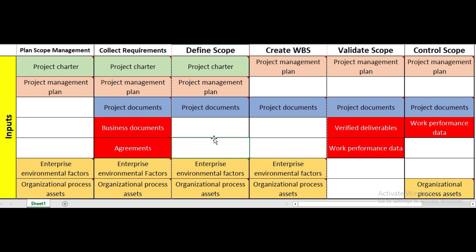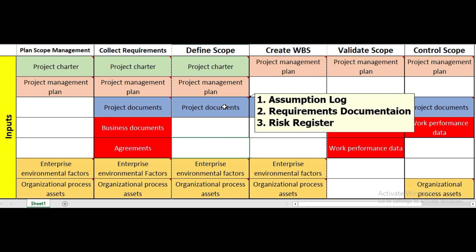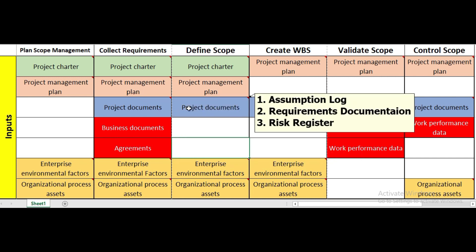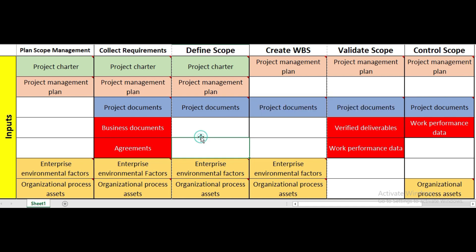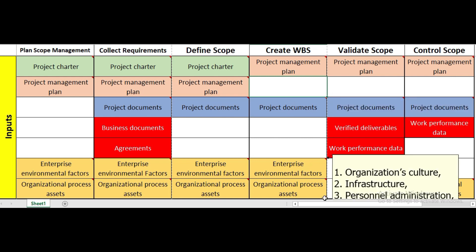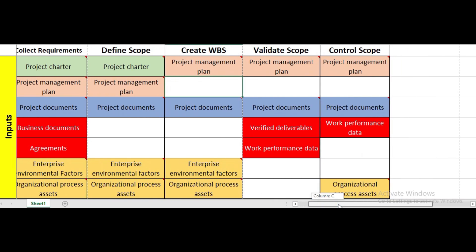In define scope, the inputs are project charter, project management plan, and project documents — the same as in collect requirements. However, the specific project documents differ: define scope uses the assumption log, requirements documentation, and risk register instead of the stakeholder register. For create WBS, the inputs are project management plan and project documents, specifically the project scope statement and requirements documentation.